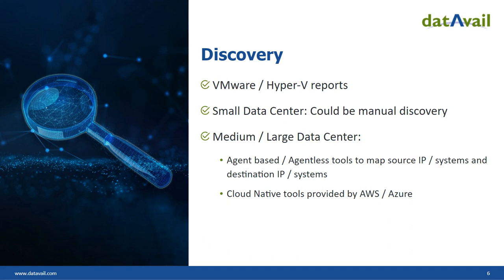But the idea is to collect information about thousands of servers and what the dependencies are, and we need that because we can't move all the servers at one time. We need to group them in migration waves, and that's where this discovery tool is very important. And if you already know which cloud you're going to, AWS and Azure being the main ones that I have experience with, there are tools which AWS and Azure also provide.